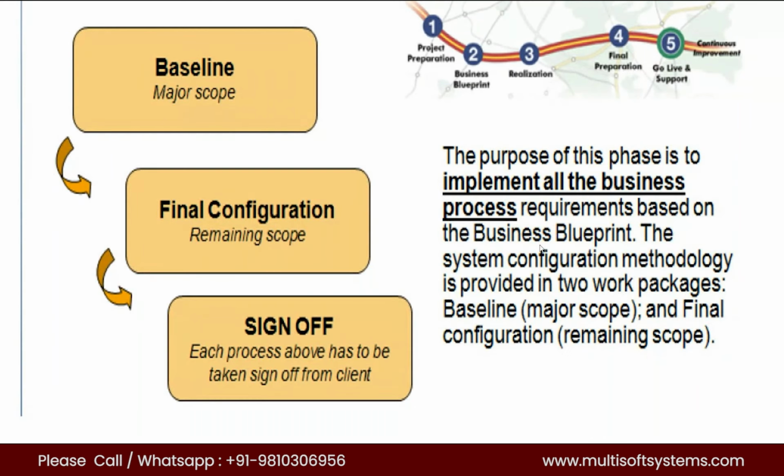Okay. Then once the blueprint phase is signed off, we'll be moving on to the realization phase. In the realization phase only, we'll be doing our actual work in the SAP system. So until now, we'll be just discussing and working on Word documents. We'll not be touching SAP at all.